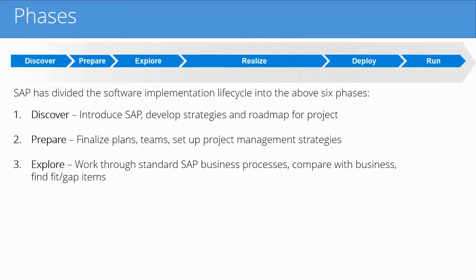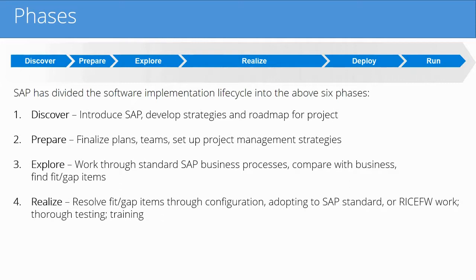Next is the Realize phase, in which the teams will resolve the fit-gap items through configuration, adopting to SAP standard — in other words, the business adopting to SAP — or RICE-FW work with reports or developments, thorough testing, and finally training, so that the users are starting to learn how to use the system that they will shortly be inheriting.